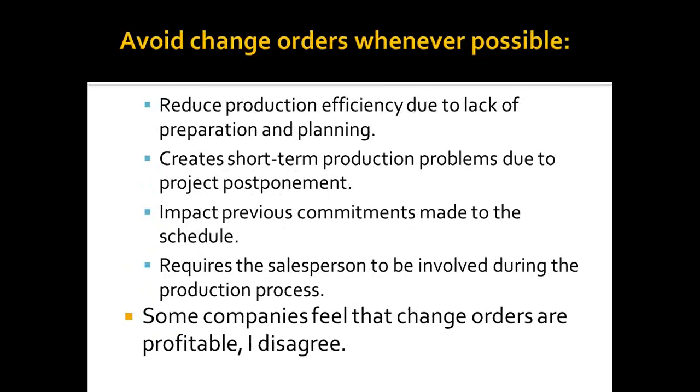The reason I think you shouldn't be doing change orders, I see a lot of companies saying, well, it's a small project, but it's going to lead to a lot of change orders. And I think those change orders end up being a lot less profitable than most companies realize. There are a couple of reasons why. I think there's a reduction of production efficiency due to just the sheer lack of time. So you just don't have the time to prepare. You can't develop your typical plan. You can't combine a lot of your resources so that you can be efficient.